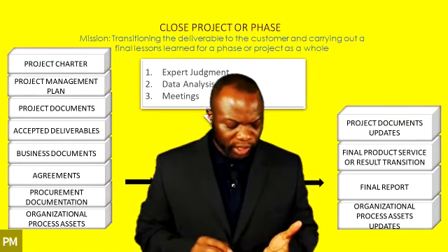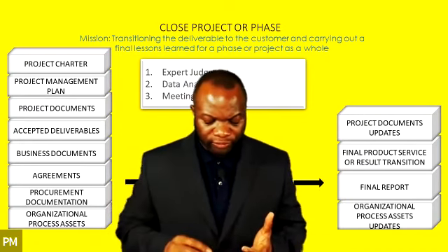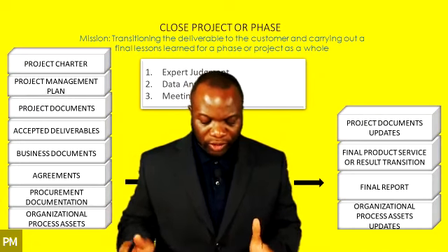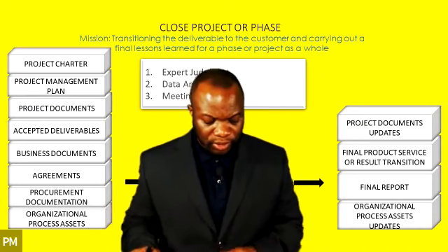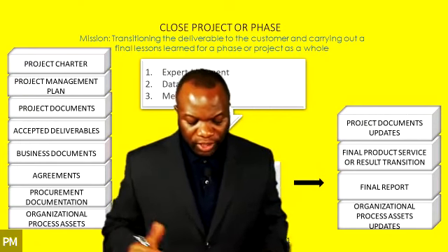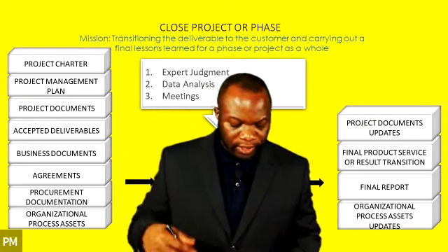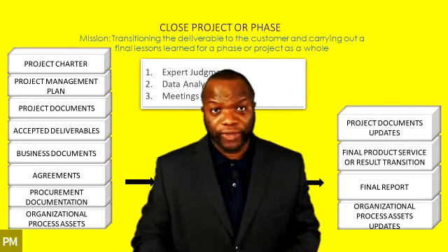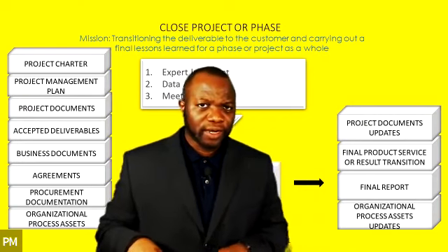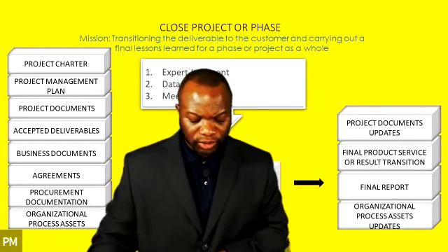Be it statement of work, RFP, RFQ, RFI, whatever the procurement documentation is, all of that stuff, it says to close the contract, all of this documentation is collected, indexed, and filed. It could be records of the ongoing procurement as it's continuing and things such as that. But we could get into a lot of detail regarding procurement documentation.